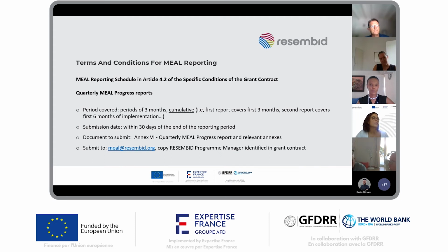Those reports will have to be submitted within 30 days of the end of the reporting period. The documents that have to be submitted are the quarterly MIL progress report, as well as any relevant documents or annexes to this report.